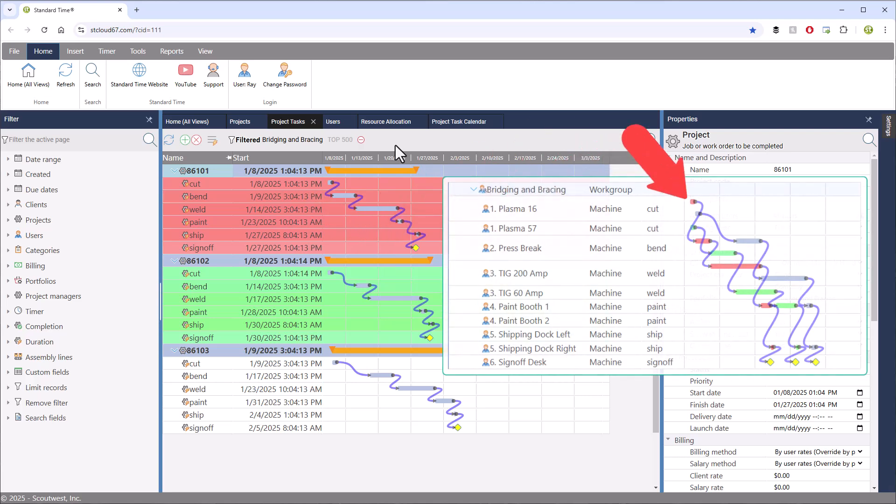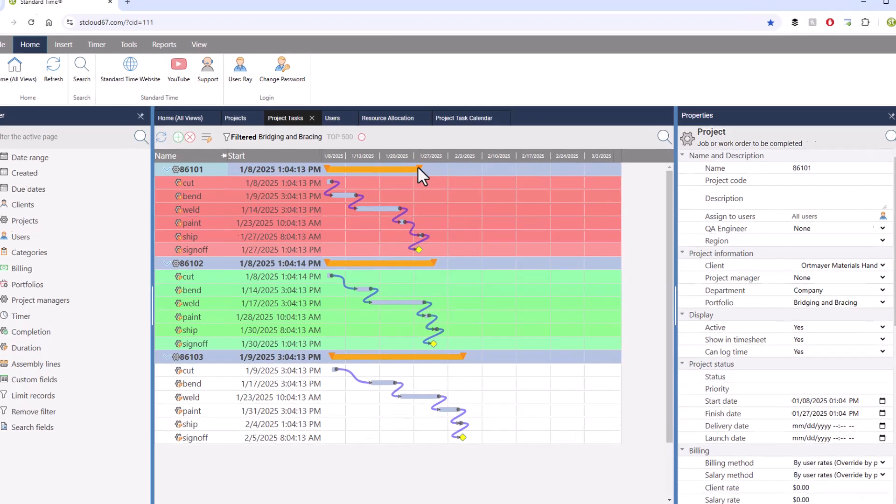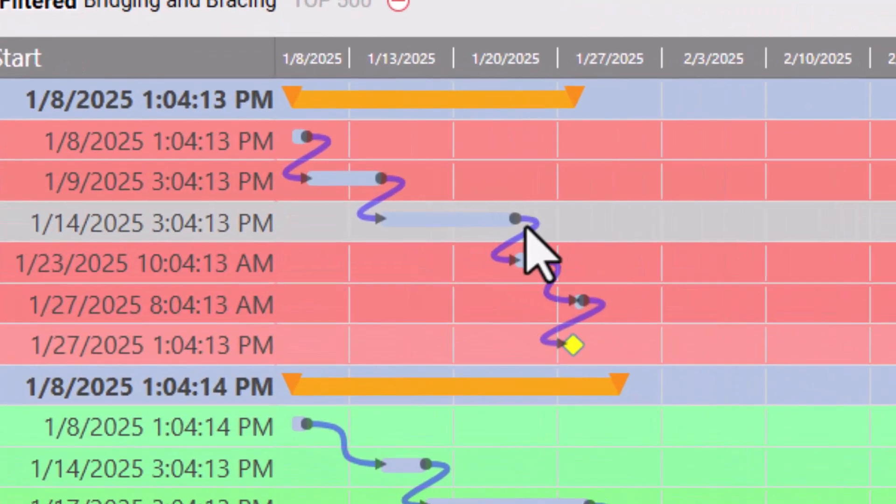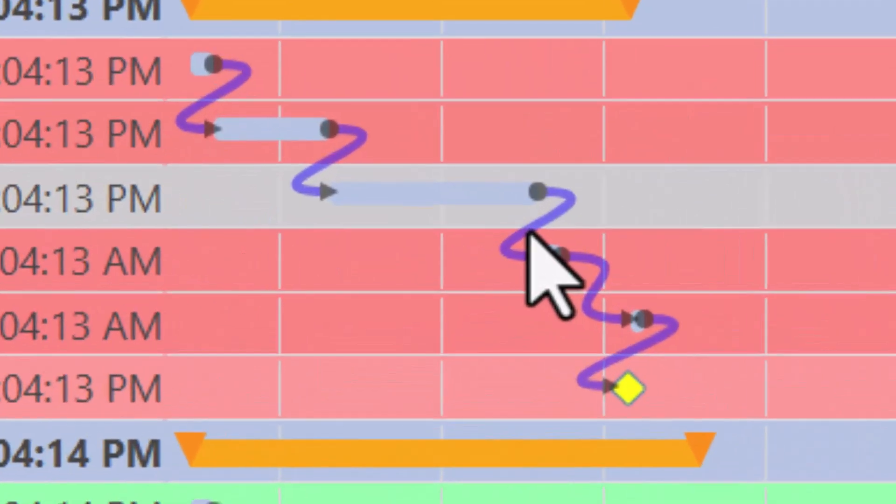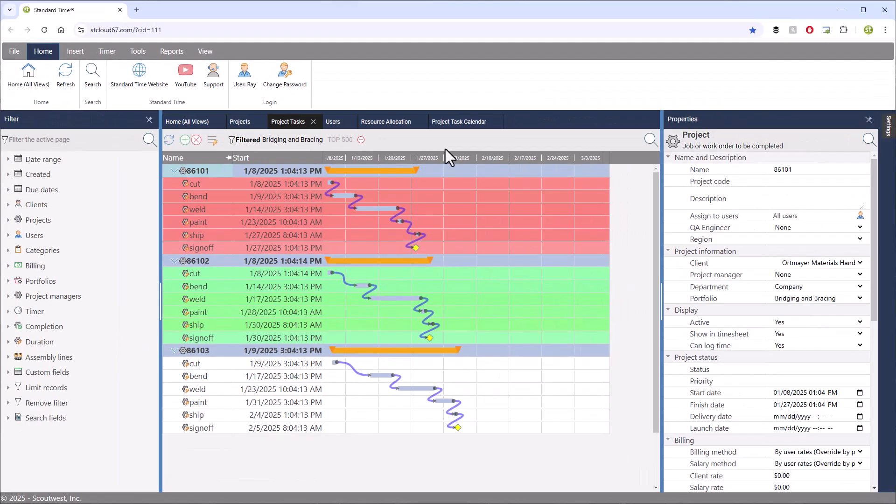Some of the tasks cannot start until a predecessor has finished. These are called link relationships, and that is the purpose of these blue lines that you see here. They are optional, but they prevent a task from being scheduled until another one has ended.